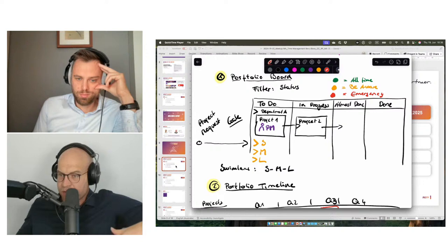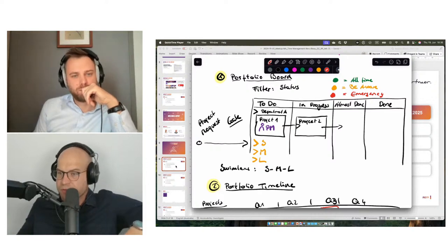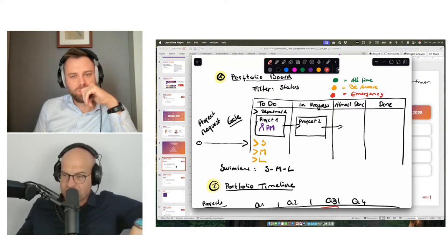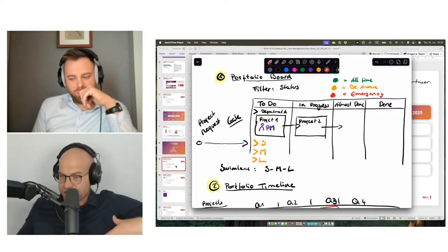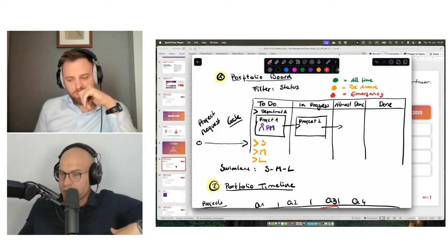Because last year roughly you had 150 projects running, small, medium, large projects in this amount and this amount, and you can have a feeling about the whole company, how many projects are possible to run through in a year. This is really valuable data if you are driving a company, because you can't push projects from above into the departments, because then the engine stops running, as they don't know what to do. They have capacity issues. They can't always start new projects. They need to finish old projects and then they can start new projects.